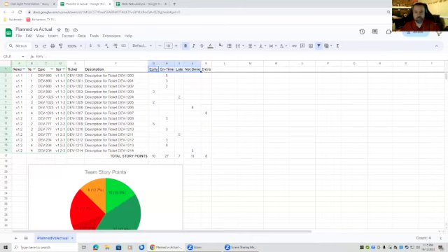And again, these buckets are based on the plan, even if the plan is the planning sprint on day one of a sprint. I've typically used these 5. Your mileage may vary. Y'all may find a different set of groupings are meaningful. So every ticket that gets done according to plan can either be early, like it was planned in sprint 3, but it was actually finished in sprint 2. On time means it was delivered, it was completed when it was planned. Late, opposite of early. Not done, meaning not being completed at all.